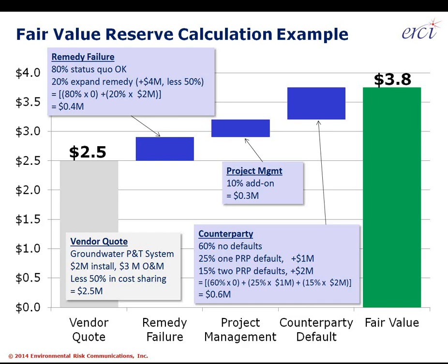The next box is project management, where we add on 10% as a rule of thumb — 10% for the internal cost of having a government-compliant cost accounting system, a purchase order system, a financial control system, a project manager who will correspond with regulatory agencies, secure construction permits, grading permits, and groundwater discharge permits. That internal cost isn't free. Burdening the cost of the fair value measurement estimate with those costs is vital, as stated in GASB 49 and ASC 410.